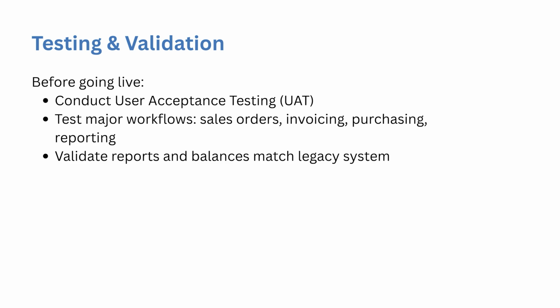After migration, test and validate data. Before going live, conduct user acceptance testing, UAT. Test major workflows: sales orders, invoicing, purchasing, reporting. Validate reports and balances match the legacy system.